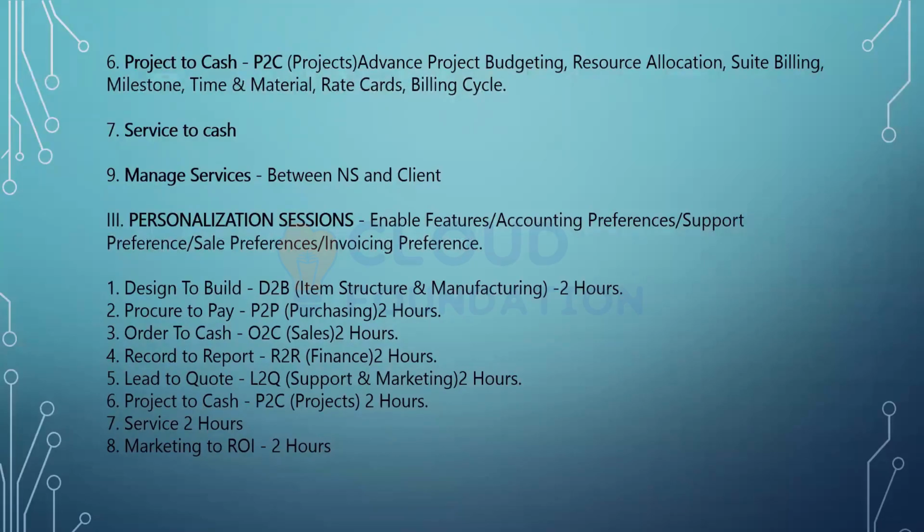So you have 5 resources on a project. 3 of them are booked the entire 40 hours and the other 2 are booking just 20 hours on that project. As and when someone books a time, you can take that time and material and create a customer invoice based on it. Then there is milestone billing.